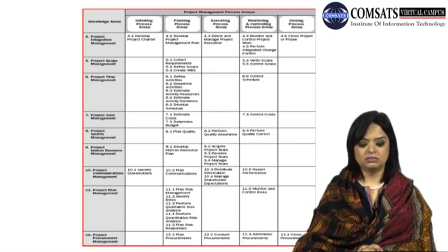Your planning phase has processes from every knowledge area. It has about 20 processes. Then implementation and monitoring and control has the rest. Your closure phase has two main processes. One from the integration knowledge area, which is closure of the project or phase, and one important process is from the project procurement knowledge area, which is closing of the procurements.